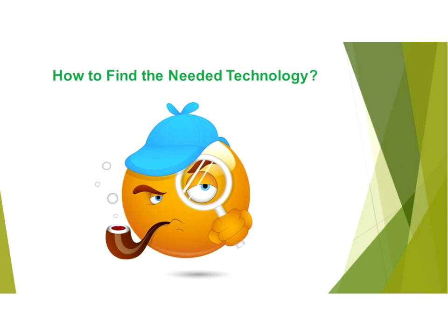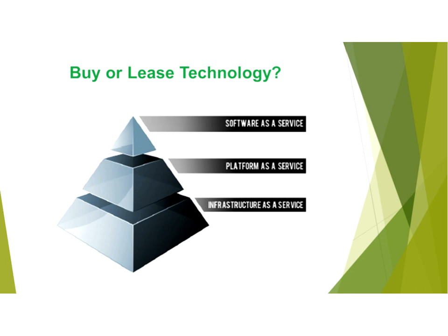Even with investigative due diligence in advance, a simple invitation to bid won't do. Technology is improving constantly, offering new capabilities or reducing the cost of existing functionality. I recommend a request for proposals process that's focused on obtaining and maintaining functionality. Also, much of the work involves integrating scheduling and dispatch software and the hardware to function as required. That's another justification to focus on functionality rather than specifying equipment.